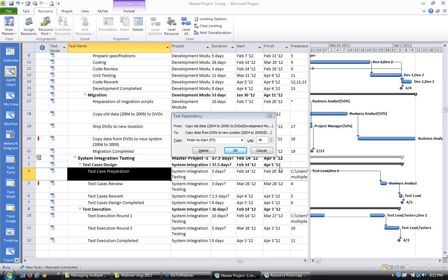Even many times when the project is very big, your lowest level unit need not be a day, it can be a week. So if in 1 week there are 40 hours, in one day he's allocated 10 hours, another day he's allocated 6 hours. But over a week, if the person is allocated 40 hours, I think you are well. There is no issue in that. If the project is running for years or so, it does not matter actually.